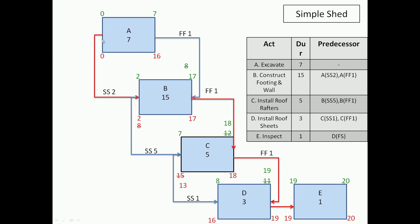Similarly, as we come down, activity C: the start of C is not critical, but the end of C is critical. So while the start of B is critical, I have flexibility with the start of C, but I have to end it on time. This is somewhat realistic - a subcontractor for C might want this kind of information rather than being told that the whole of C is constrained within a particular range.